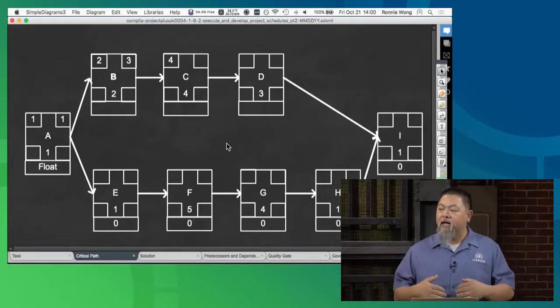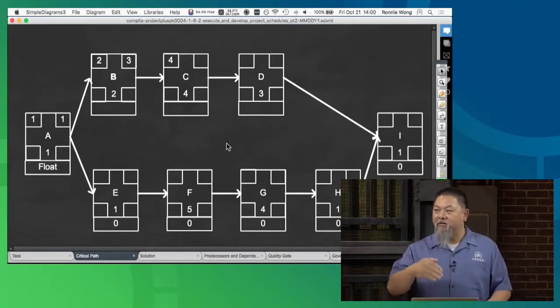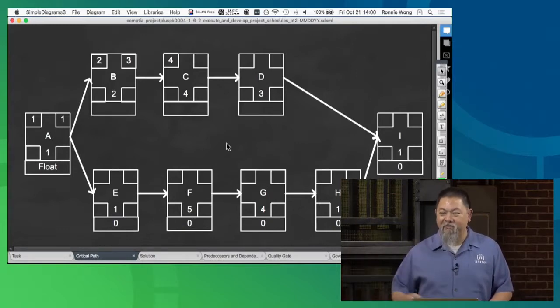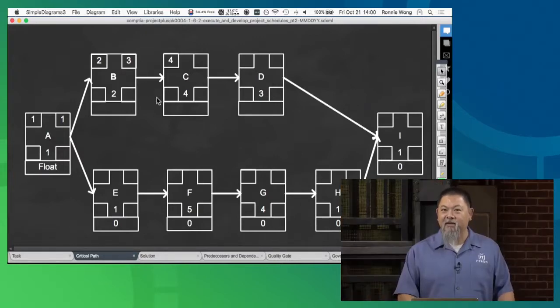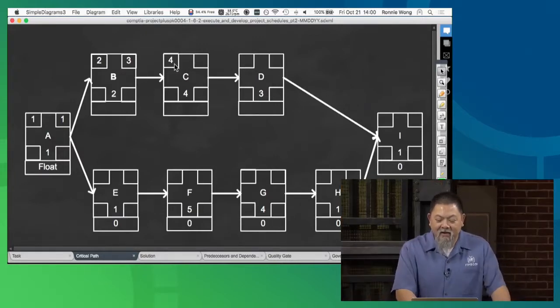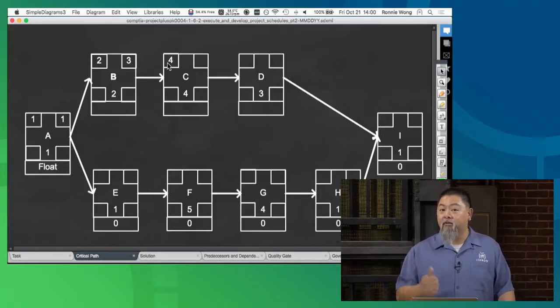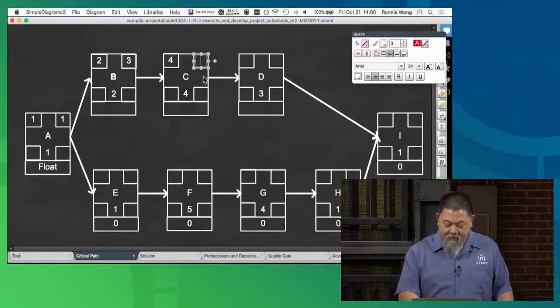All right, because the way that we're calculating is not at the end of the business day, but at the beginning. When we count, we always count from the end of that number and go up. You would think, yeah, but no. That's what you would think. But notice that that's not the way that this one works here. So now, if we actually start on the 4th, we count the 4th, 5th, 6th, and 7th, right? That's 4 days. Okay, so this would actually end on the 7th. So far, so good? Yes.